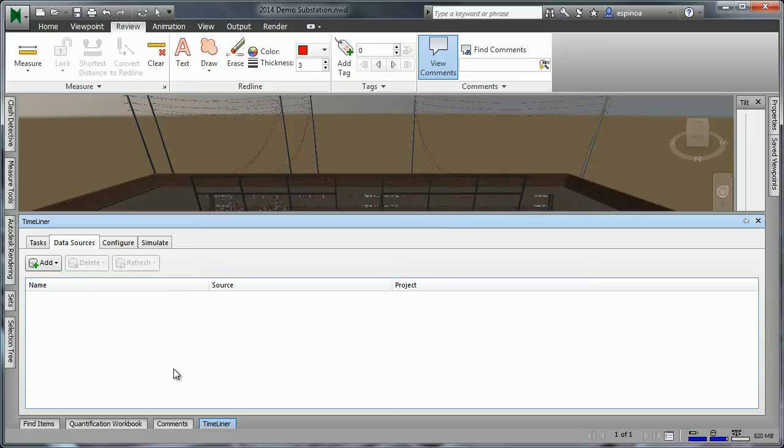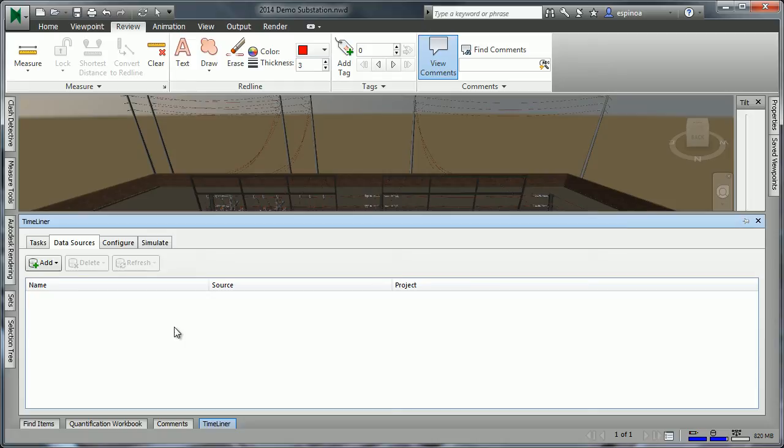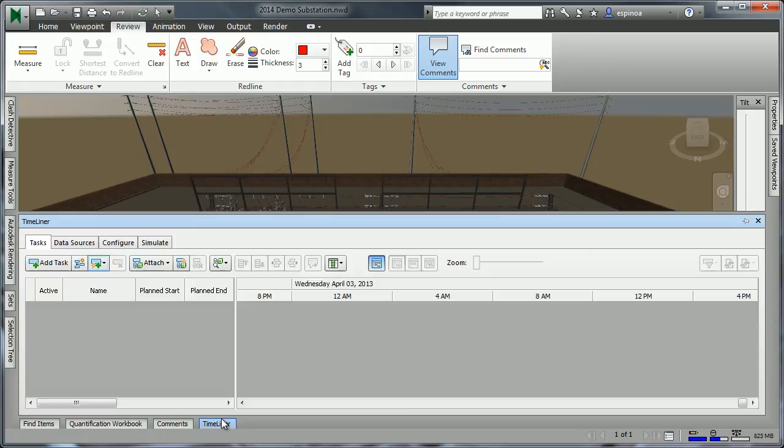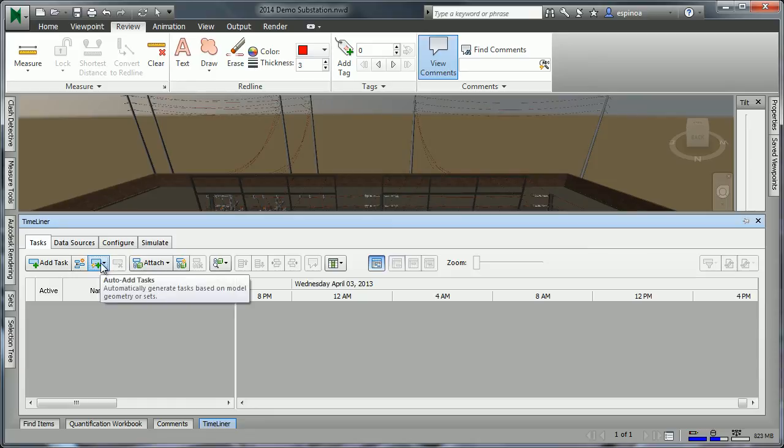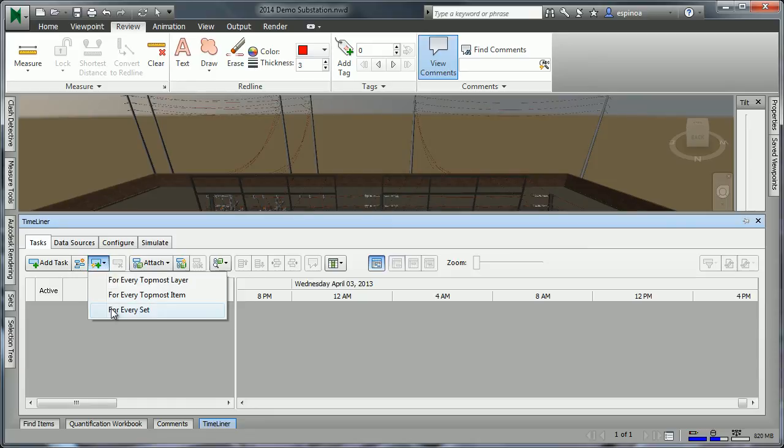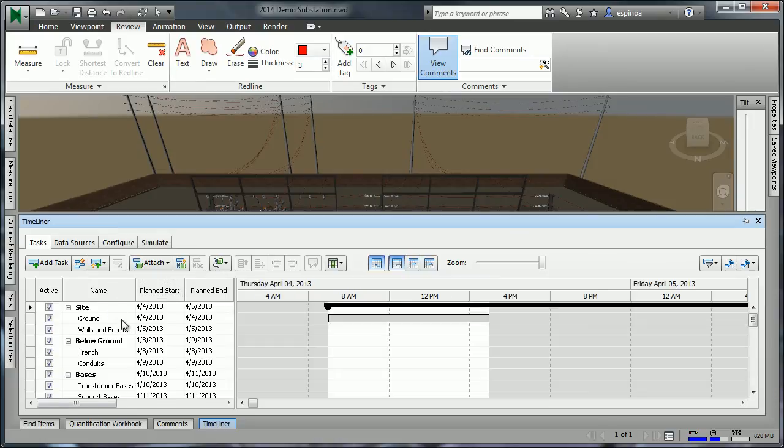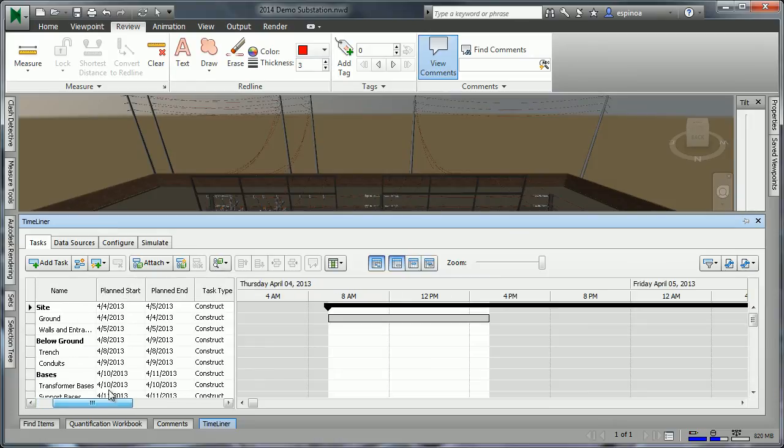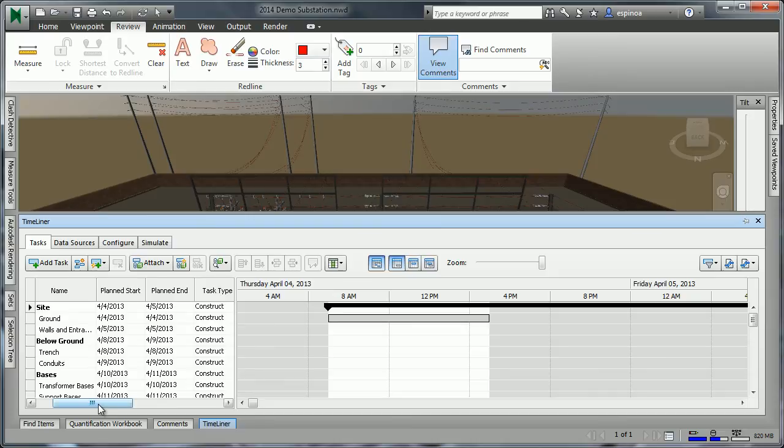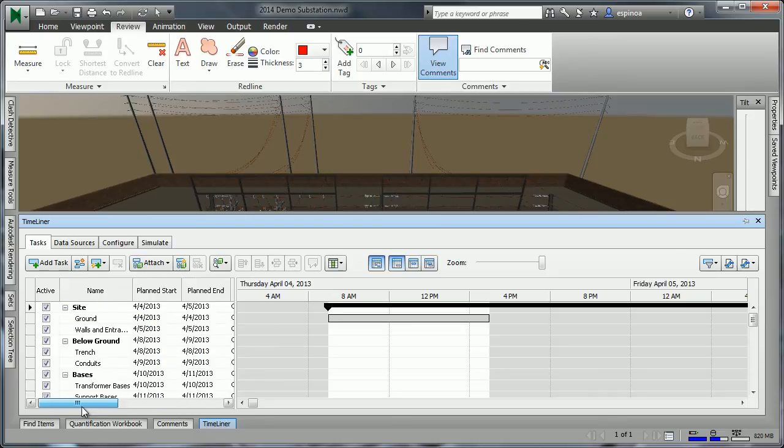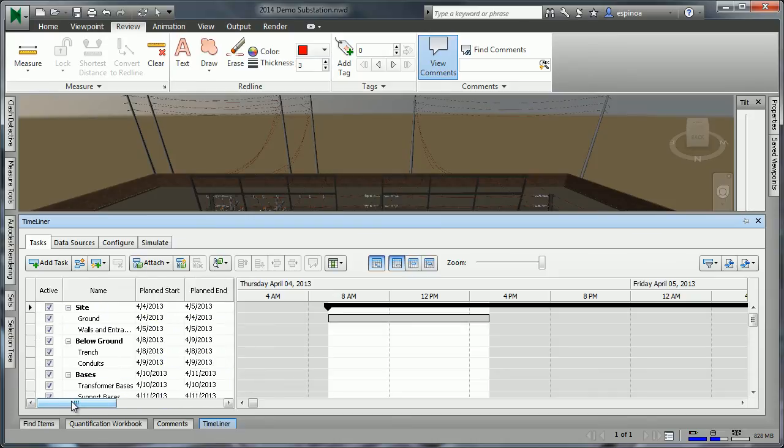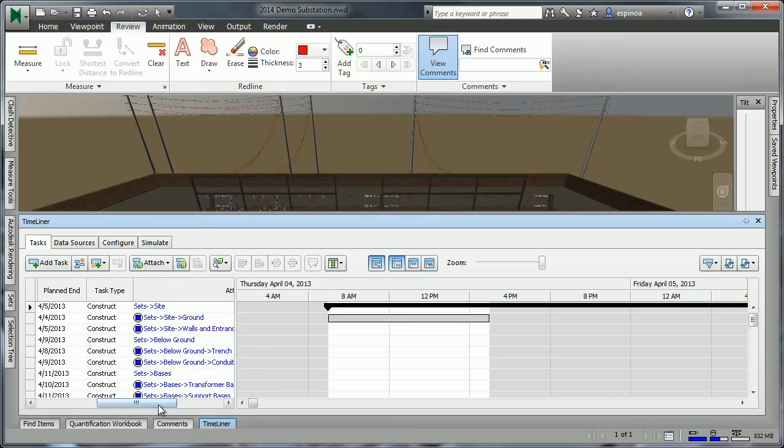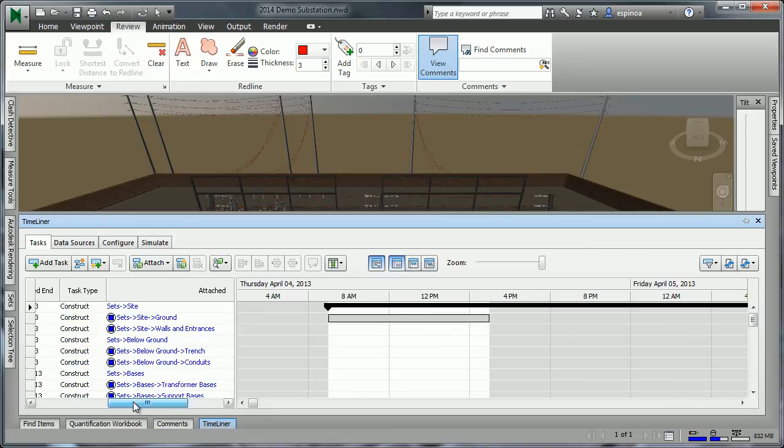Once the tasks are in place, it's possible to push these tasks to the sets to populate sets more easily. It's also possible, once we have sets, to push them straight into the tasks. With the auto-add tasks, we can say, create a task for every set. All of our sets would be populated, along with the preliminary date and time. And we'll notice that the attach of the objects are already present.